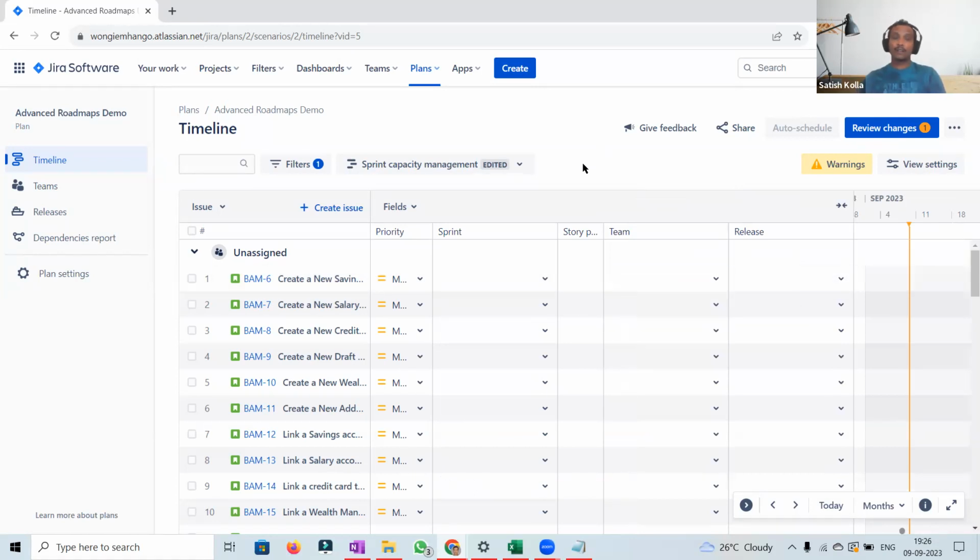So why are we doing it here? Because let's suppose all of us are product owners. We are discussing our dependencies before going over to sprint planning. Then we might say, we have a dependency. For creating a new account, I need the customer ID. Can the login team pass that customer ID to us? Can you complete it by sprint 1 so that our team can start working on sprint 2?